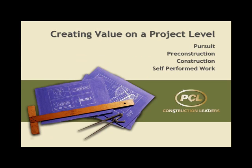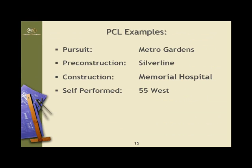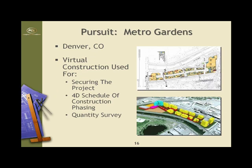Here are some examples from different phases of projects: pursuit, pre-construction, construction, and self-performed work. Metro Gardens is the first example. We used it during the presentation to the owner to try and win the project. The biggest thing we used it for was a 4D schedule, and actually extrapolating a 5D — which is the 3D model combined with the cost of the project every month and then the manpower loading as well.